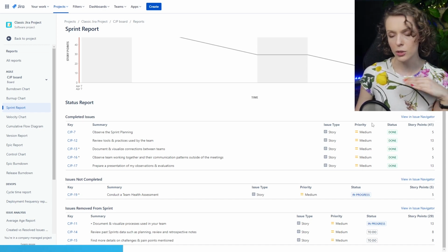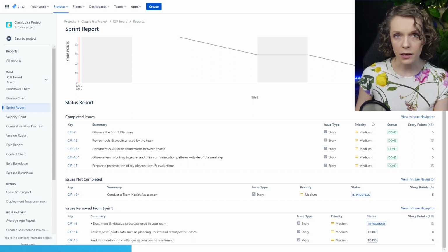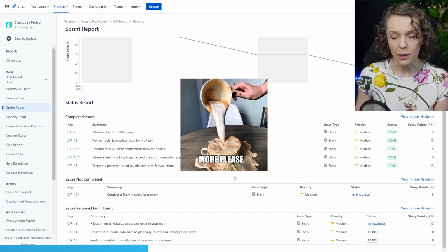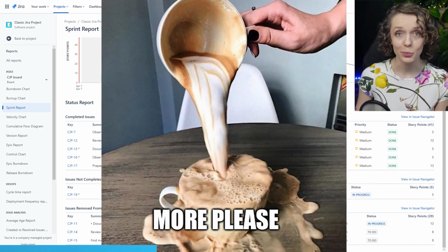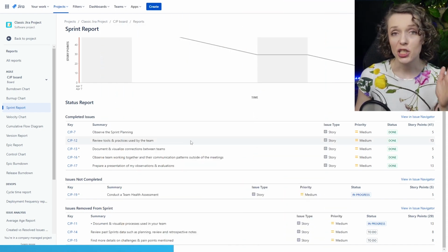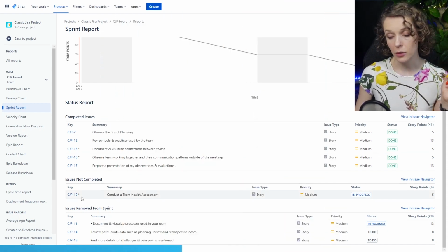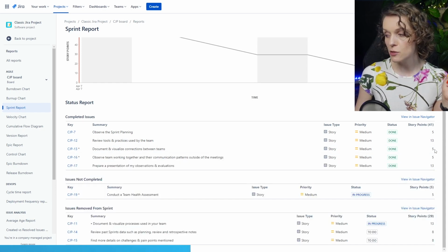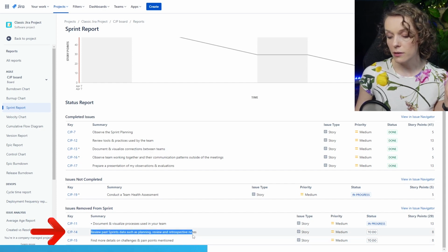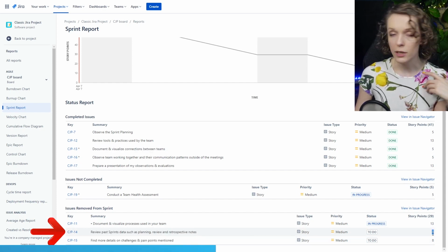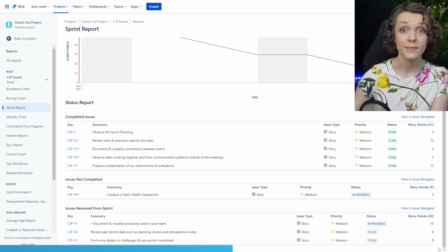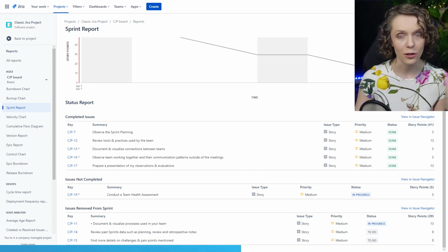So if we take in new work, we don't remove anything, and we clearly are unable to achieve that amount of work, then that kind of reminds me of this meme. Why are we trying to put in more than what we have the capacity for? Generally, it is always a good idea to replace the work, right? So if we're adding something new, we added this new 5 items, 5 story points, let's remove something else, right? So, well, here we have something, 8 story points, let's remove it. That way we replace it, and if we're out of work, nothing to do, we'll go back to the product backlog and we'll take it.